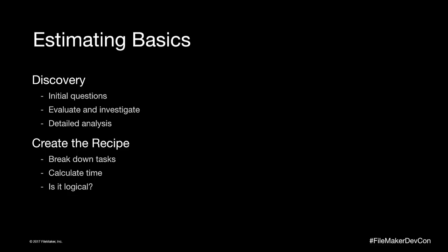Was I within budget? Was I over budget? And you could figure out why. Maybe you spent a lot more time on this part than you thought you would, so next time, if you have something similar, you can budget a little bit more. Maybe this thing over here took half the time. And so it helps you become a little bit more accurate.